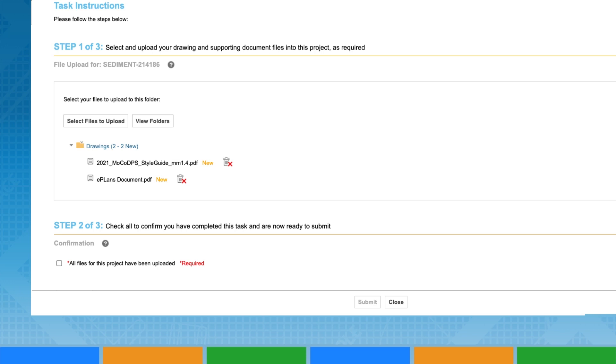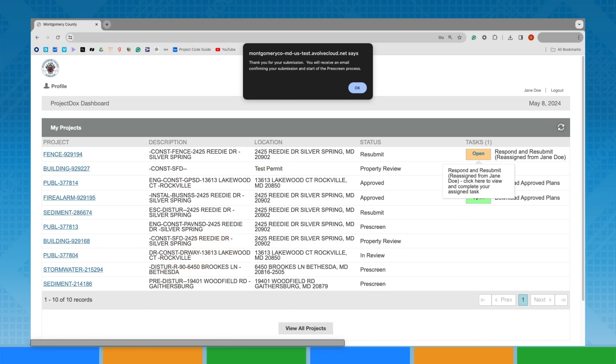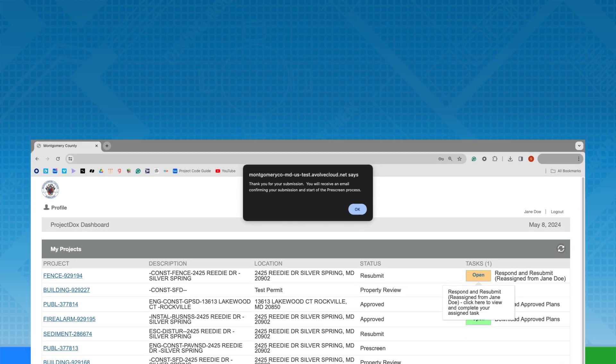Once all information has been uploaded, verify it conforms to the DPS submittal requirements by checking the confirmation box, which activates the Upload Complete Notify County button to complete your task and alert DPS staff to begin the review process.